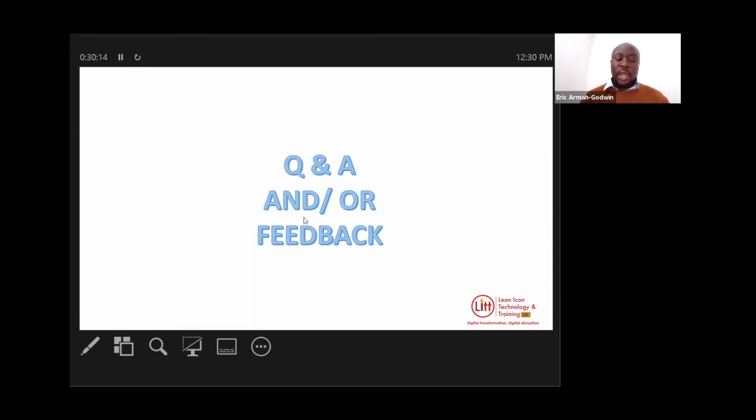Cut my long story short. And remember in traditional testing, we talked about exit criteria. As part of my exit criteria, I will define what done means. Let's say 100% test cases executed. We want 100% priority 1 or severity 1 defects fixed, that sort of thing. So you define all those things and that becomes your definition of done.